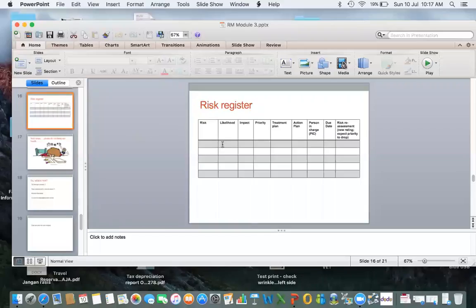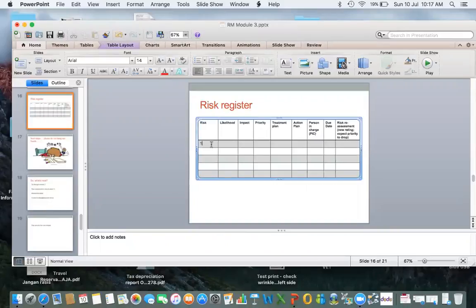I'll just type it here. We got the priority, let's say risk 1. We got the likelihood 2, and the impact is 4, and the priority or risk level actually, but that is fine. 2 by 4 equals 8. And let's say the second risk. This one here is competitor. I'll just type it here, competitor.